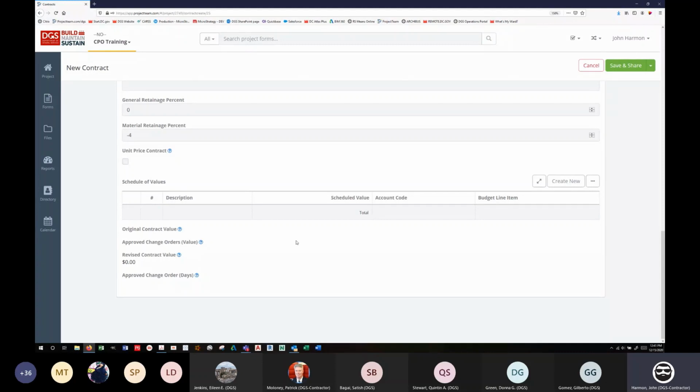So if you ever have a question, something's not working right, your contract doesn't have the right end date, something like that, come back here and take a look. See if this all has the right info. If it doesn't, that means the system doesn't have your change orders correctly. You're missing an additional value, or you're missing some additional days. If it's a date that's off, you can quickly check right here and get all your info, and then you can go back to your change orders and figure out if you need to make some edits or you're missing one or something like that.